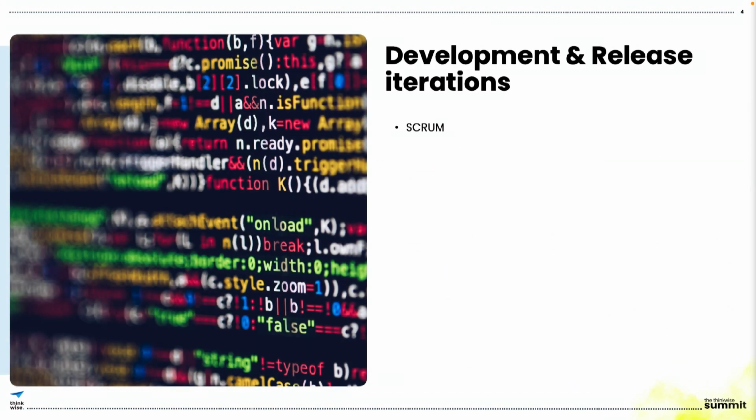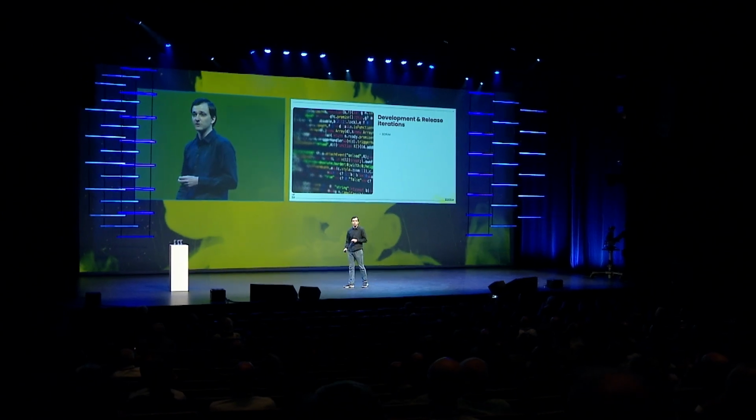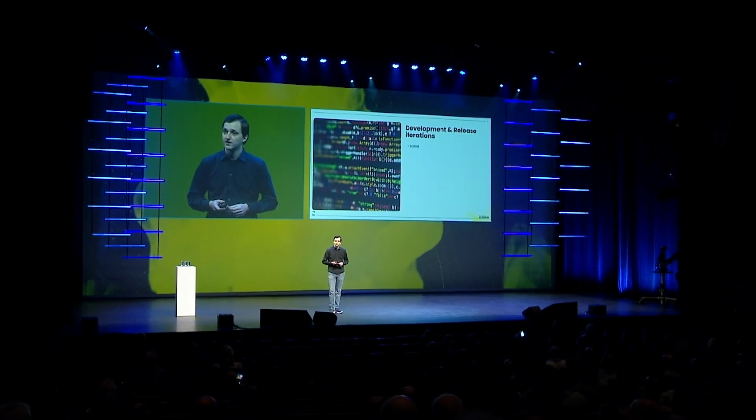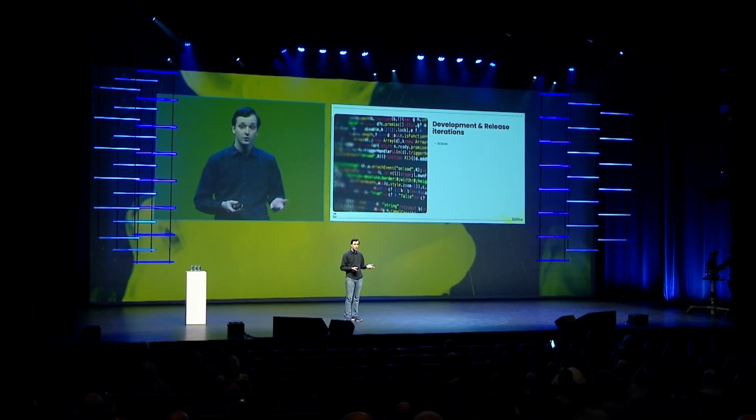Well, how do we develop? We utilize Scrum, and that is not only for our team, but also for our whole product innovation department. All of our teams work in 4-week cycles, in which we develop the next version of the respective component. We utilize for that Azure DevOps, and that is our project management tool. We use it for our product backlog, for sprint backlog, for our code repositories, and much, much more.